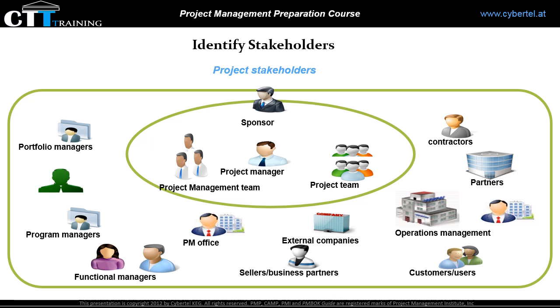It's really important to identify the stakeholders at the very beginning of the project and classify them according to their interest, influence, and involvement in the project. Why? To fulfill their expectations from the project. Also, knowing the timing of stakeholders' involvement in the project will enhance the positive influences and reduce the negative impacts. In this process, you will need to create a strategy to analyze their level of interest, expectations, power, and influences. And this assessment of the stakeholders should be reviewed and evaluated periodically to adjust to changes that may happen through the project life.